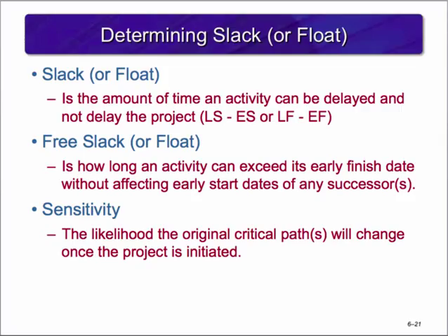If there is a likelihood that the original critical path will change, it is said to be sensitive. Sensitivity suggests that once the project is initiated, one of the near critical paths could end up being an additional critical path or even the new critical path should any activity slip and cause that network path duration to increase equal to or greater than the critical path duration.